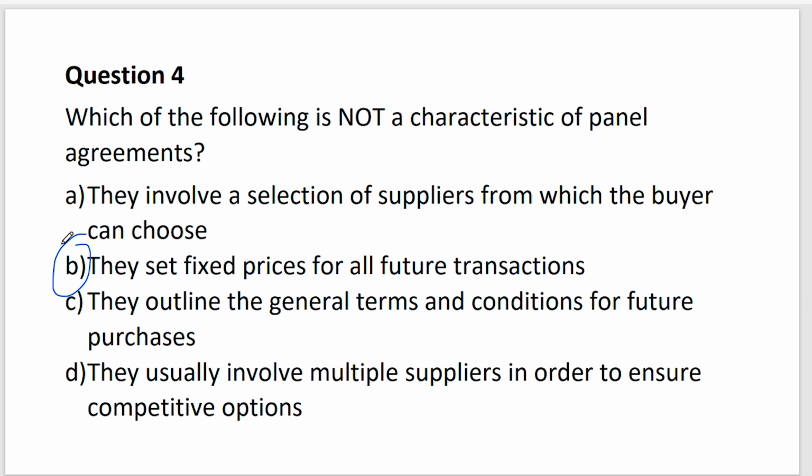I mean, prices is a bit interesting. Depending on whatever you are dealing with, it's not always the case that in your framework agreement you'll just have a fixed price. You can have a ceiling and a floor price, like it will range around here. Because if that thing is supposed to go for an entire year and it's January, the supplier must be smart enough to know that if you agree on a fixed price in January, what if things go up in, like, October or November. Okay, we're in November, right? So all those are some of the things that make the all-fixed-price thing not make sense.